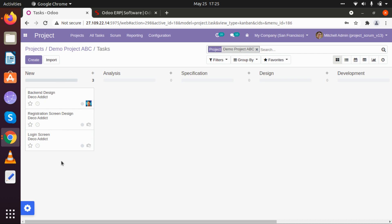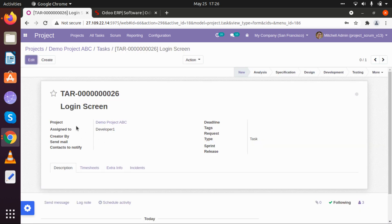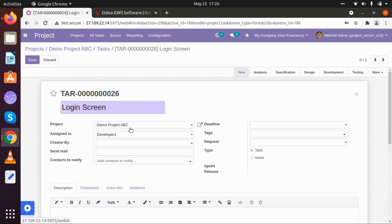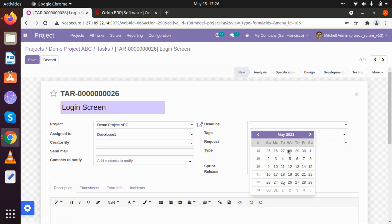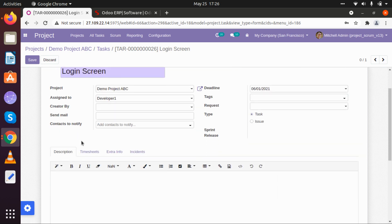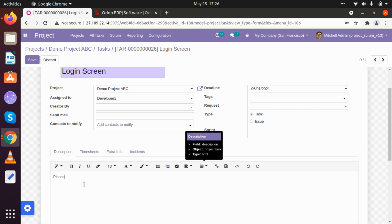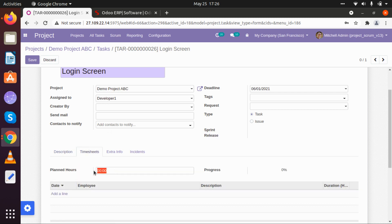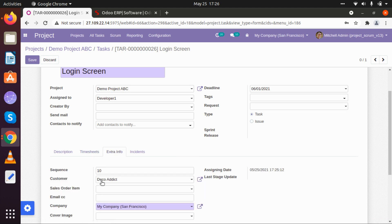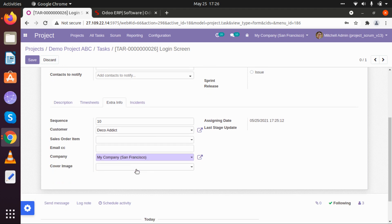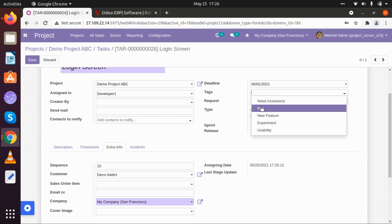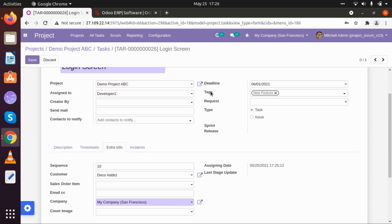Now if we want, we can move those tasks directly from here to another stage, or we can go to those tasks and edit them. Let's go to the Login Screen task. Here you will be able to see the basic details like project and assigned to. Now let's create a deadline — I am creating a one-week deadline. Let me add some description: 'Please complete login screen within one week.' If we want, we can assign planned hours such as 24, 36, 32 or whatever hours directly here. Any extra information can be stored in the Extra Info tab. If there is a tag, we can add it here, like 'new feature'.